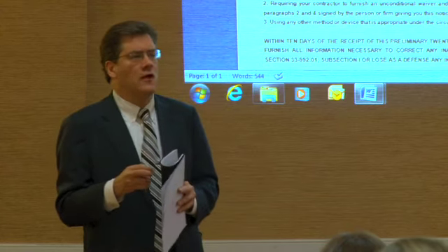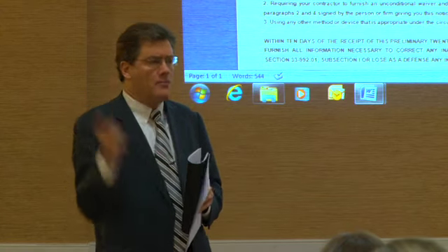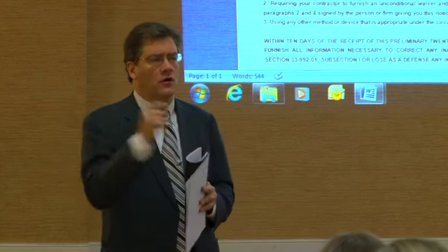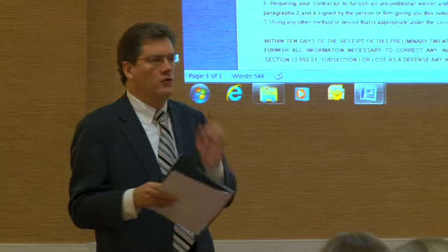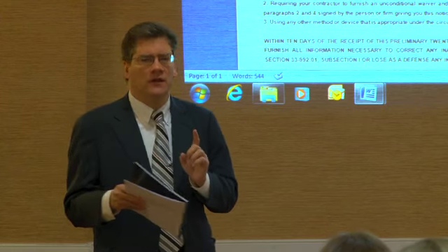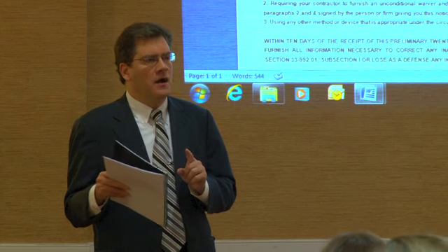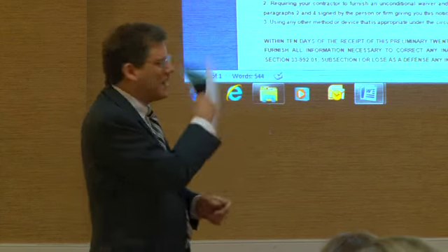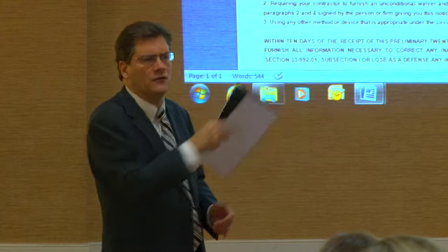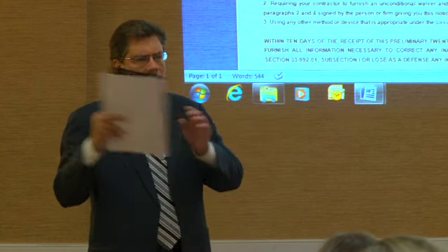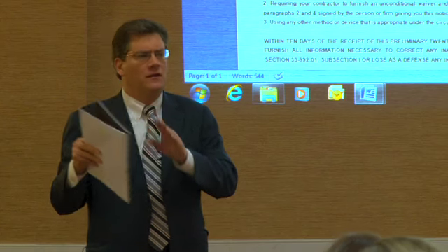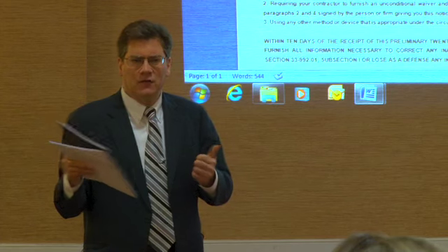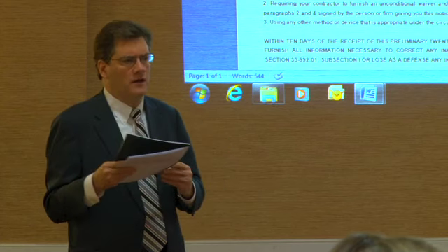Now, you've got to, as quickly as possible, turn right back around and get that preliminary notice out, corrected to all the parties. And there's no statutory deadline for doing that. Presumptively, it's within 20 days. I like to stay within those 10 days because that's the timeline context that's running there. So you want to get it out again by at least a certificate of mailing to prove that the amended preliminary notice went out to the parties.